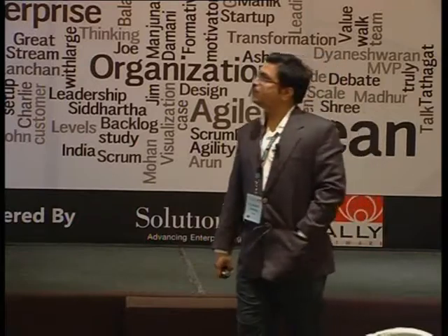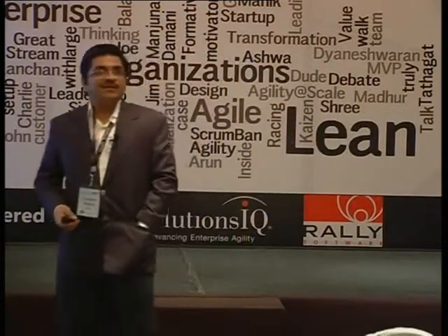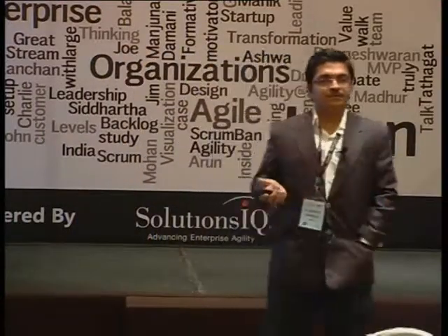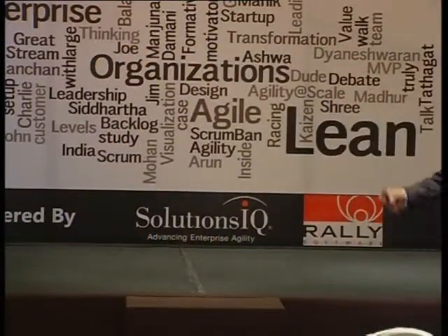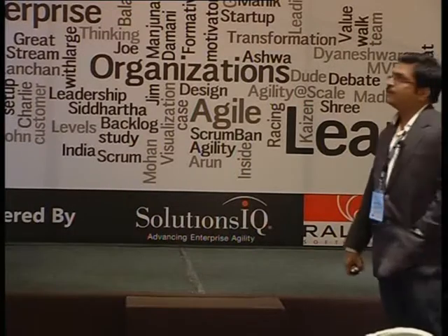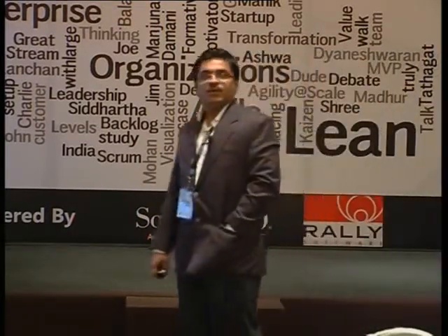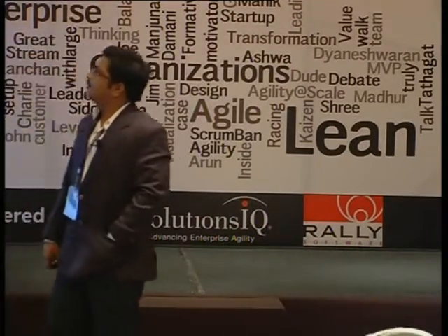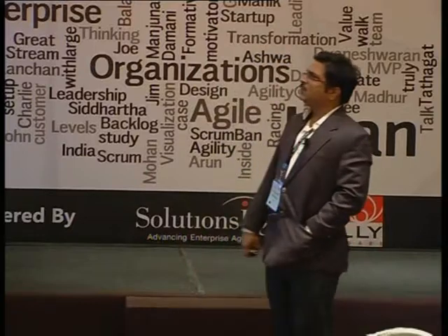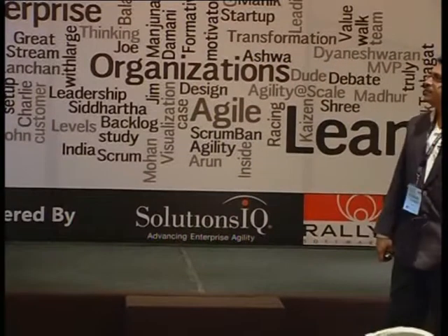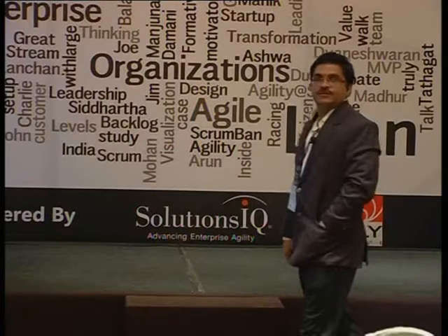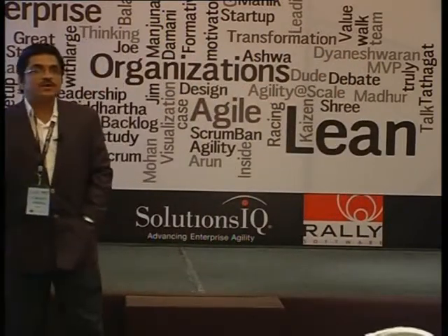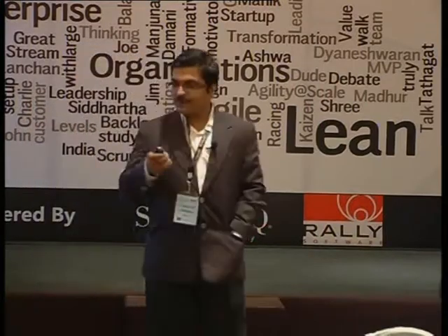So basically it's a question of early finishes not getting rewarded, and it's only the delays which get passed down the system. And the team needed to understand the backlogs and the prioritization. There was no single place where we could look back and understand what the backlogs and the prioritization are. And there was considerable effort spent by the leads and managers. They were spending about half a day to 1 day per week just to collate the status and present the status to the customer.